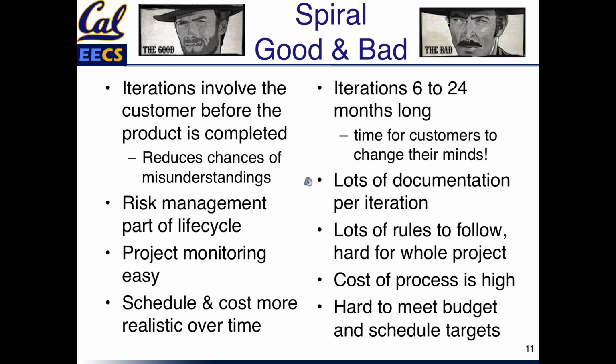The bad things are these iterations are pretty long. They could be half a year to 2 years long, which is plenty of time for customers to change their mind if it takes a year between iterations. Lots of documentation for every iteration. Every iteration, you've got to write a new set of documentation.